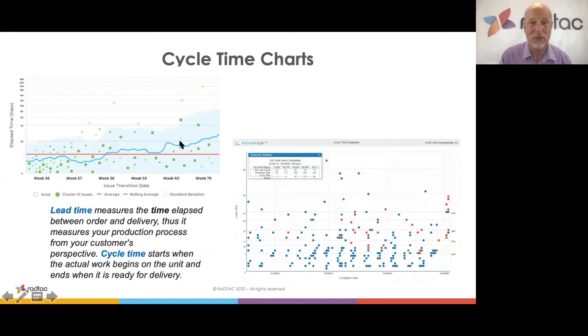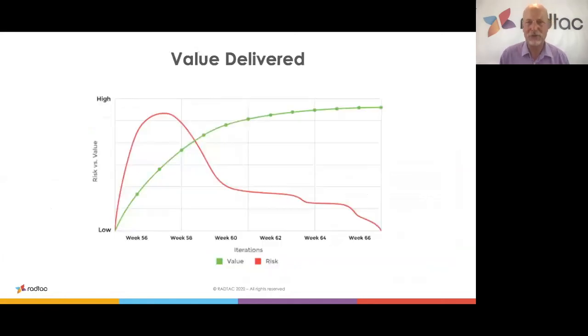So these are two good measures, or two different ways of looking at measuring cycle time. So yes, either a cycle time scatter graph, or this sort of approach where you look more at the rolling average, and then look at the standard deviation between the average and the rolling average. Obviously, we want that standard deviation to be as small as possible. We want to be pretty near, either exceeding the average or pretty near the average. By the way, the more you can make the cycle time average, the more predictable it becomes. So it's a really key measure within any team. We want to create an average cycle time to get predictability.